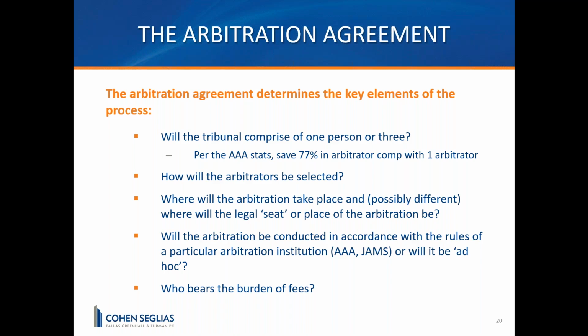We also received a question on what types of things would conflict an arbitrator out of a case. It is cases where they've had a lot of contact with one attorney group or one law firm versus the other. We've seen situations where an arbitrator has tried 10 cases for a law firm in 5-6 months. That could be determined to be a cause for them not to sit on the case. I've had situations where the proposed arbitrator has sued in the past our client or the other side. Things of that nature. Anything that would throw a judge out would throw an arbitrator out.